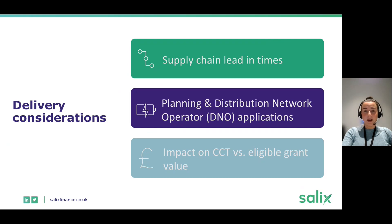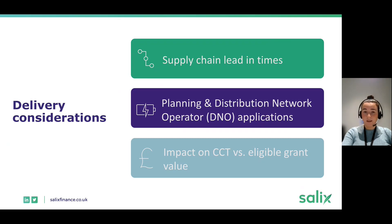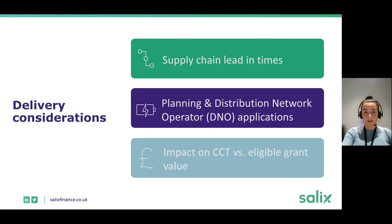An important point is that changing the project scope can impact the carbon compliance threshold. If you're spending the same amount of money but gas savings have reduced because you removed certain measures, the eligible grant value may decrease due to the CCT. Be mindful of this before the grant end date and before resolving conditions, so you can ensure you're receiving the grant you originally applied for and are eligible for.